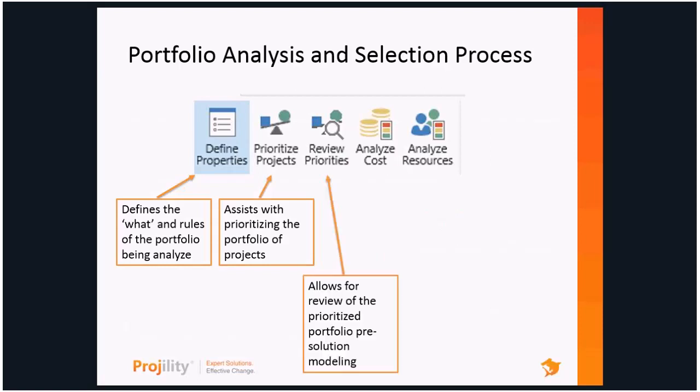That's what project prioritization is going to allow us to do. The results of the prioritization are going to come out, and this is where the executives in the room are going to be able to see the reality of the situation. When we review our priorities, it's going to stack rank our projects based off of all the feedback and allow us to actually review that and determine, is this the go forward set of projects? It's also going to tell us, objectively speaking and data driven, what our top priority and our bottom priority projects are, so we can very quickly take a look and say, well, there's projects here we probably shouldn't be doing. Why don't we move them out of the portfolio, and then we can figure out what we're going to do with the budget we have.